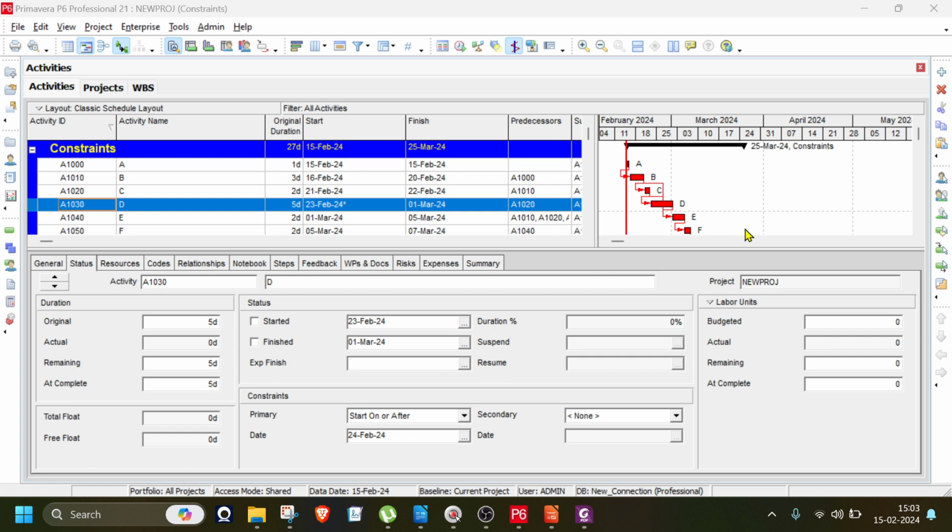Maybe the client might say, give me the categorization of the supply chain management. There might be hundreds of suppliers. Give me the categorization of the workers list. In a project where I worked, there might be 50, 60, 70 activity codes. We create codes and keep them ready. Whenever they ask for any reports, we immediately view them on the group console, take the printout or send the report to them, so they can see it categorized.